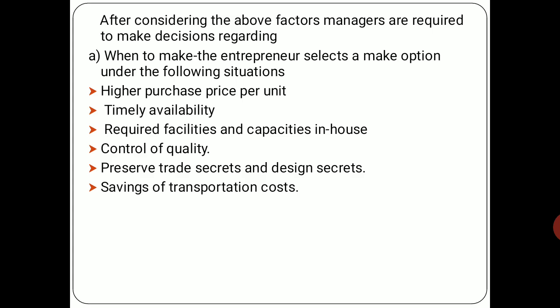Make option means, when does he take the decision to make it himself? Everything in-house. When the purchase price per unit is higher, right? When he tries to buy it from outside, it may be costly.